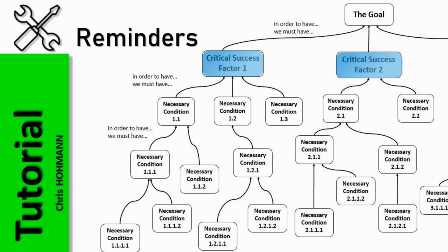They are the very last milestones before achieving the goal, and conveniently serve as a simplified, high-level dashboard for monitoring the progress towards achieving the goal. Once built and scrutinized, the logically sound goal tree is a roadmap to achieve the goal, as well as a communication tool, a work breakdown structure for managing the journey as a project, and a benchmark.